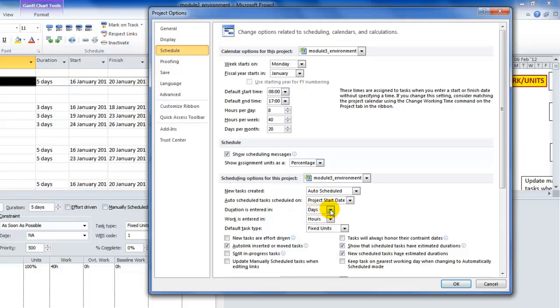But suppose you were initially planning a very large project, large in terms of time. You might want to have the units shown, and we're talking about these units here, in the duration column, for example, as showing in weeks. Perhaps you're talking about a 3-week task, a 10-week task, and weeks would make most sense rather than days. Whatever you set here, you can still set days, hours, or minutes if you wish.